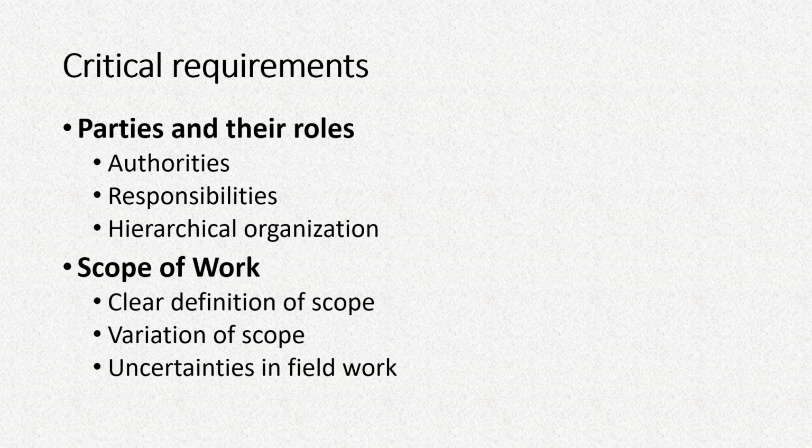Then comes the scope of work. Now, scope of work or scope of any item means that, for example, if you mention installation of an elevator or lift in a building, then how much does that scope cover? What is the scope of that work? Is it only installation of the machinery, or does it also include installation of the security cameras, all the electrical components and all those things? So it has to be very clearly mentioned.